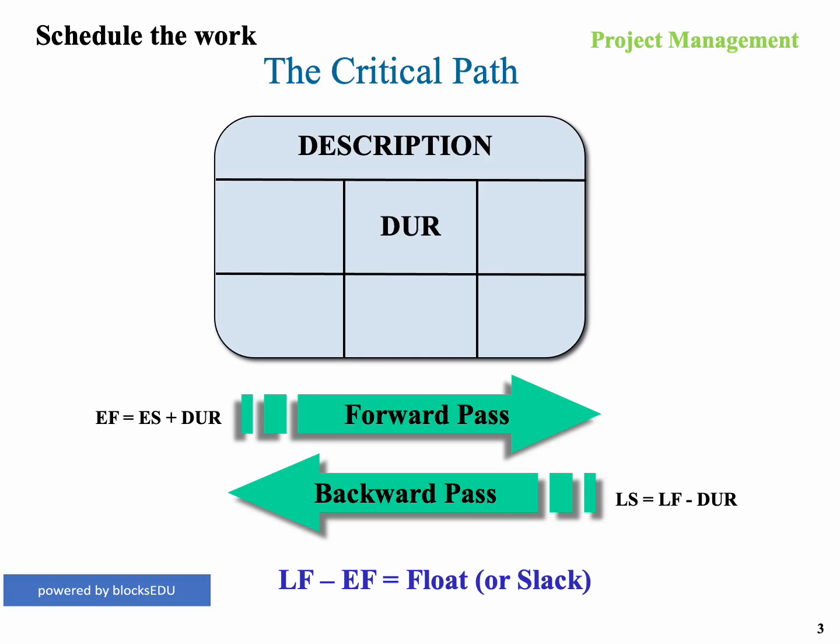DUR stands for duration. This duration comes from our work breakdown structure, and it's actually the only thing we know at this point in time. ES means the earliest this task can start. EF stands for the earliest this task can finish. Then we have LF, which is the latest this task can finish. And then we have LS, which is the latest this task can start.